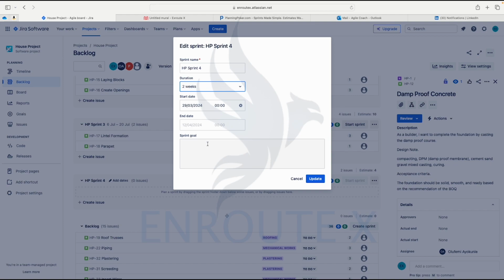I made mention in the sprint planning class that each sprint should have a sprint goal, just one sprint goal, ideally, because the entire team is expected to be cross-functional, delivering just a piece of value. That is what is expected ideally. But when you get to the field, when you get a job, you would realize that there could be different goals within a sprint.